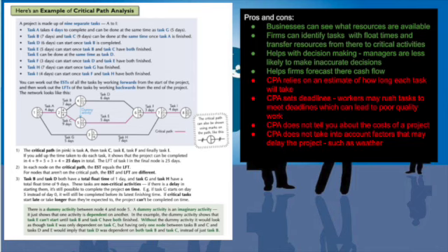But just remember, this is the most important part I'm going to say, so listen carefully. Start with your first node, where you draw 1 and 0, 0 as the earliest start time and latest finishing time. Then just calculate the earliest start time for each of them first by adding it on. Keep on adding it on. Remember, go back to the previous slide and it tells you to add on the duration. And once you do that, you'll get to the final node. Then you can work back for the latest finishing time.